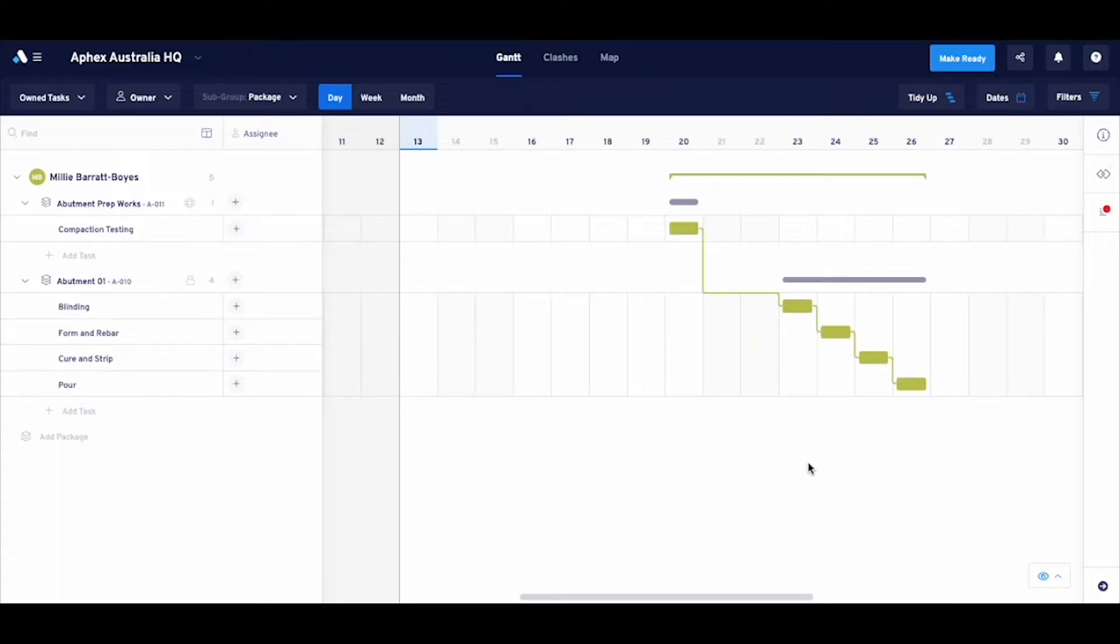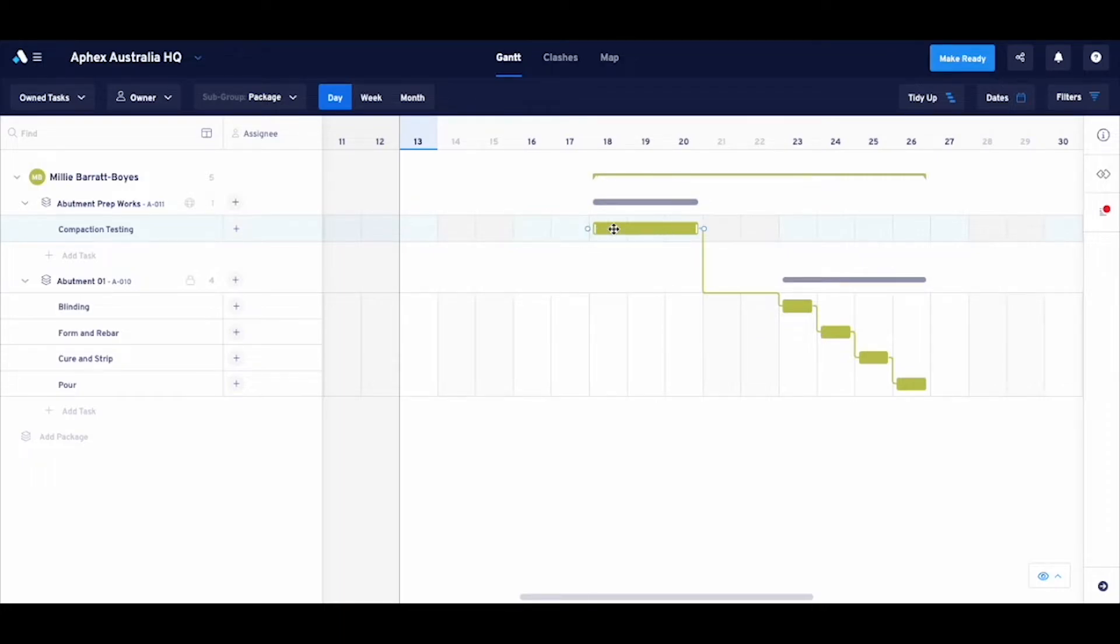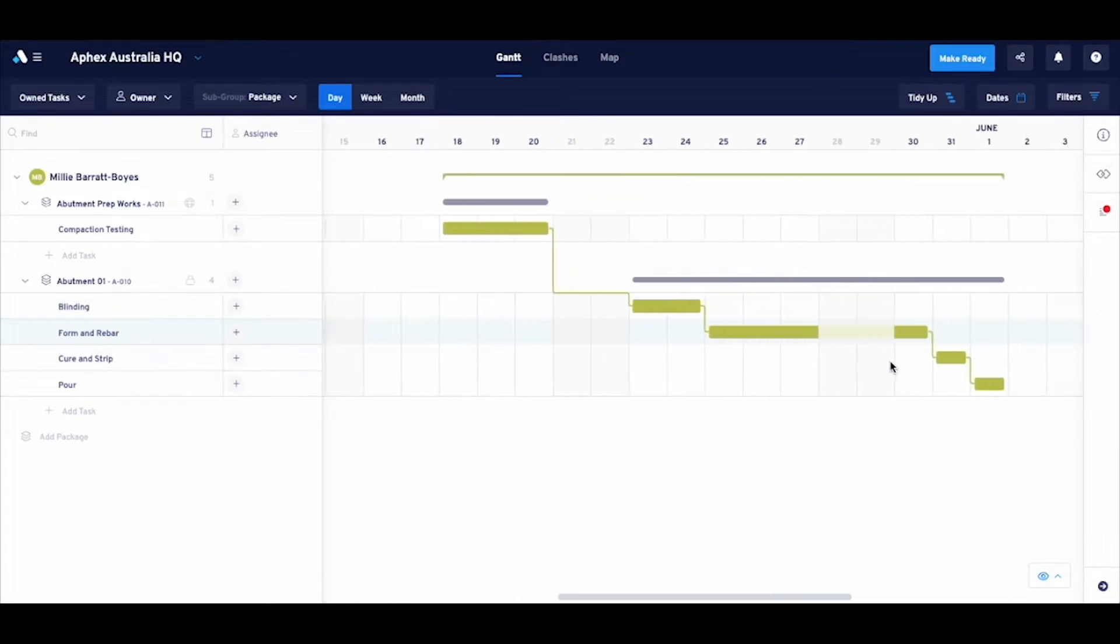Now, let's talk task durations. I have the choice of editing the start and finish dates as well as task duration by clicking and dragging the specific task bars for the task in question.